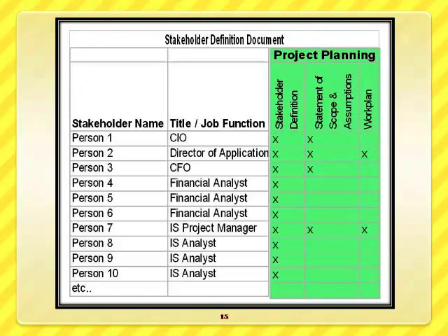So this CIO, Director of Application, CFO, these are all people who are involved in the project planning stage in defining the stakeholder definition, what is required for each stakeholder. In the work plan stage, all people need not be involved. Only, for example, here, the Chief Financial Officer and the Information System Project Manager. These two are enough to be involved in the project planning work plan stage. So we need to define a stakeholder definition matrix,